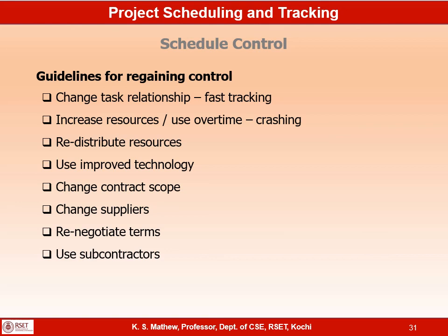So once you renegotiate the terms with the supplier and change the contract to fixed price plus incentive fee, things will change automatically, immediately. The supplier will do whatever possible to deliver in advance so that they can get extra money, and they will try to avoid the slippage so that they will not lose money.